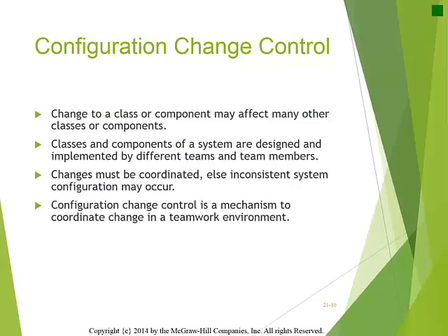Based on the change analysis results, the maintenance personnel prepare an engineering change proposal, ECP. The ECP consists of administrative forms and supporting technical and administrative materials that specify the proposed changes, reasons for the changes, the affected components, and the effort, time, and cost required to implement the changes. The priorities of the changes are specified, and a schedule to implement the changes is also described.